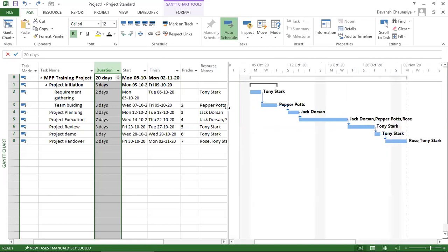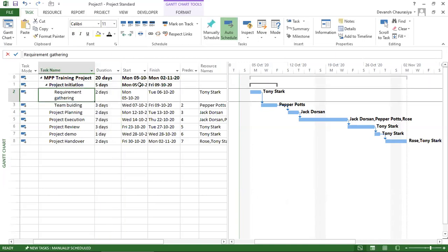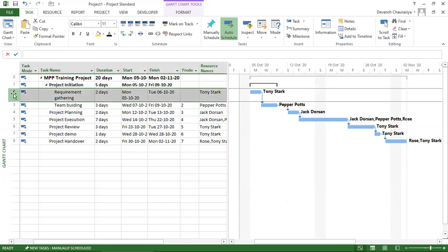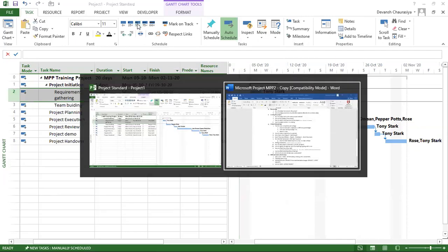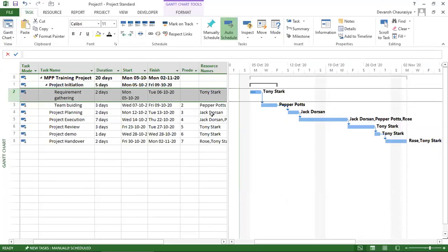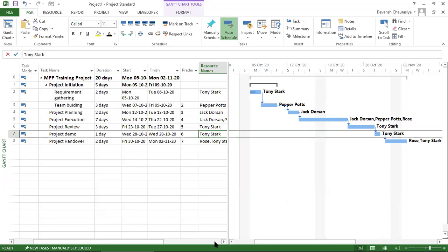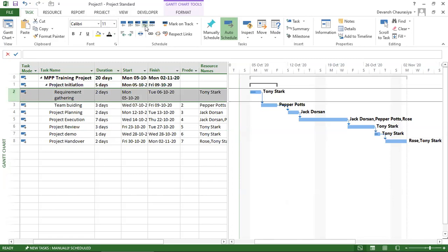To mark task completion, first view the entire project. Assume a task is 25% complete — a small blue bar appears inside the Gantt bar. Under the Task tab at the top, you can click 25%, 50%, 75%, or 100% completion buttons. Selecting a task and marking 50% increases the blue fill bar; marking 75% increases it further; marking 100% completes it visually.